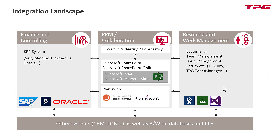Every arrow represents a possible integration use case where we transfer data from one system into another to get processes integrated — offering team members the possibility to track against Jira work items that belong to a project in Planisware Enterprise, which reports back into a project in SAP PS with a corresponding WBS structure. So we have the full chain of processes integrated, which also means data are being integrated.